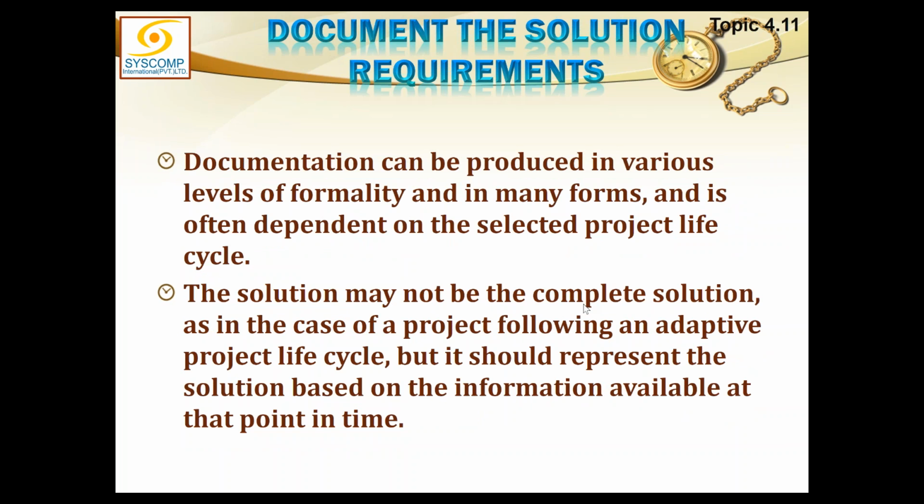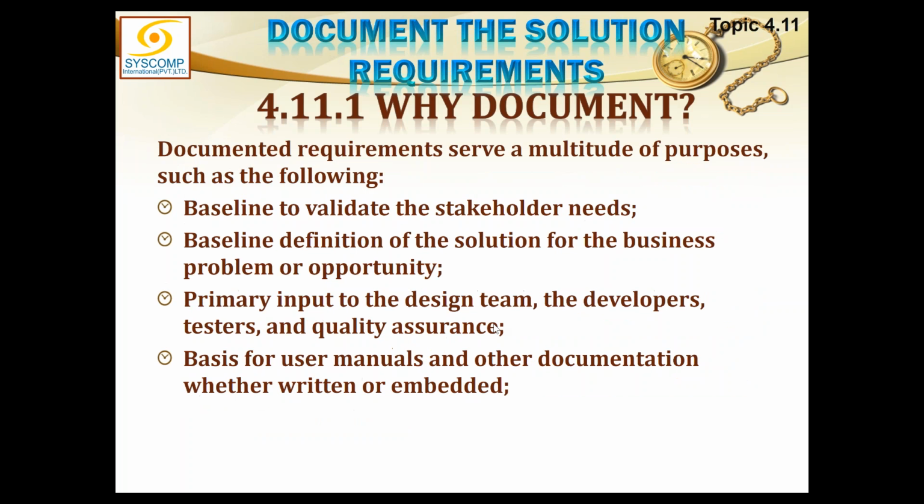Documentation can be produced in various levels of formality and in many forms, and I would say in varying levels of detail also. So it is often dependent on the selected project lifecycle what level of detail, what level of formality, and what formats you are going to be using. The solution may not be the complete solution at this time, as in the case of a project following an adaptive project lifecycle, but it should represent the solution based on the information available at that point in time. So if you are following an adaptive life cycle, the solution will evolve. You will achieve the solution in small little iterations. But for a waterfall model, we do have a complete solution. Again, it will be elaborated although.